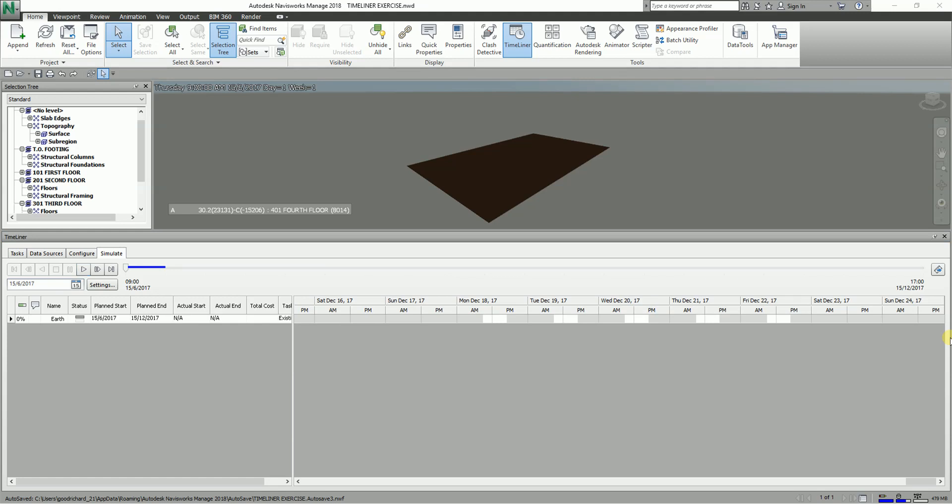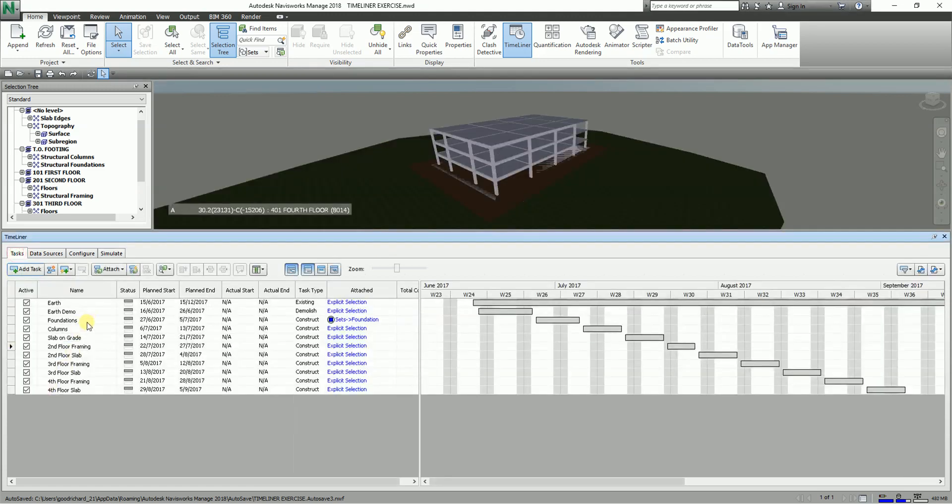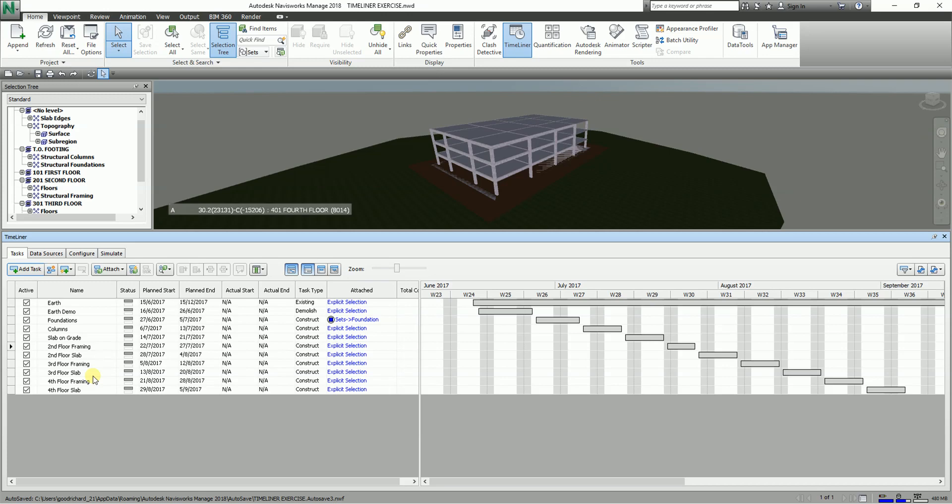So let's say for example, instead of creating the task here like what we did, what we're going to do is we can create this task - let's say you already started the task using Microsoft Project, Primavera and those things. After you create those schedules, you can actually import it here in Navisworks Manage.